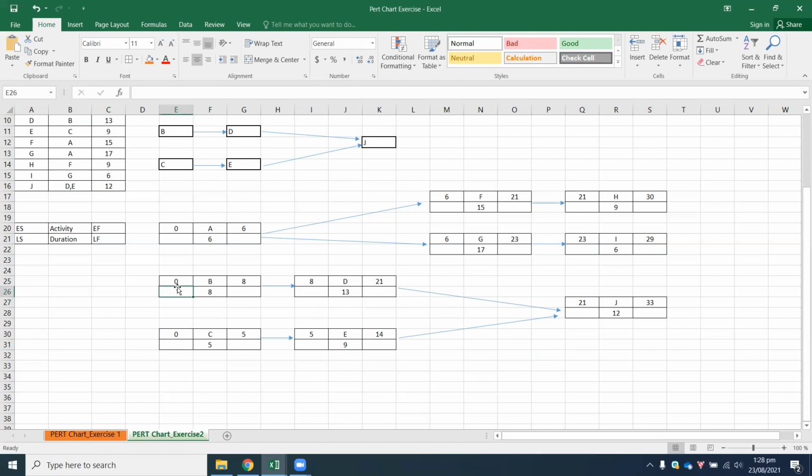Now, with the late start and late finish, we generally start from the opposite order. That means you move from the right to the left. Whatever duration you had finished with becomes your late finish for that specific ending activity. Then instead of adding, we subtract. What Monish is doing at the moment is very much correct.